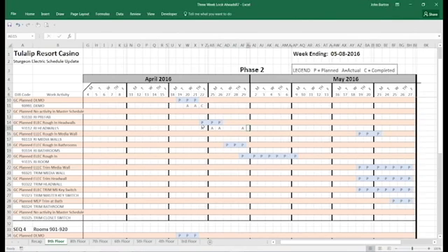This is the worst case scenario because we know something happened that didn't let you finish your work, but you still had to come back and do it. But by doing that, that's great. And if we know that you went back and actually worked that day, but you really didn't finish till this day, that's where we would put the completed. So this is just a real easy way, using just A's and C's, actuals and completed, for us and for you guys to have a general idea on what happened on that floor.